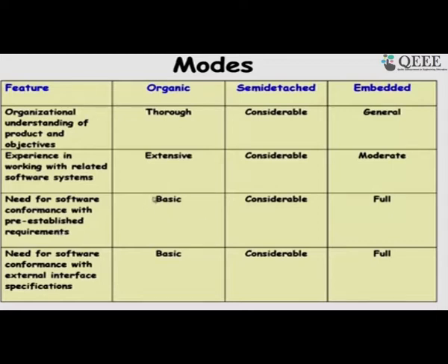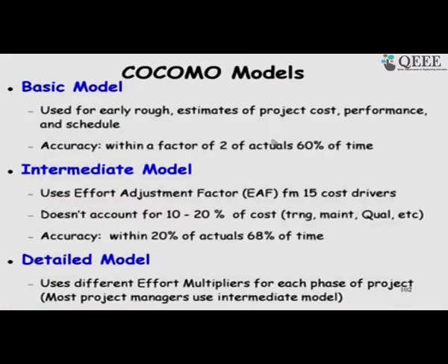So, very stringent checking with the requirements, then if there is a full checking, it will become embedded. Need for conformance with external interface specifications. So, it has to work with other software, and if there is a full need for such a thing, then it may become embedded.